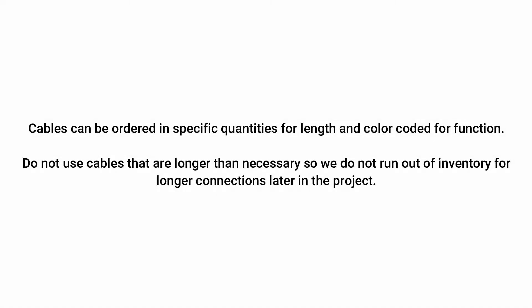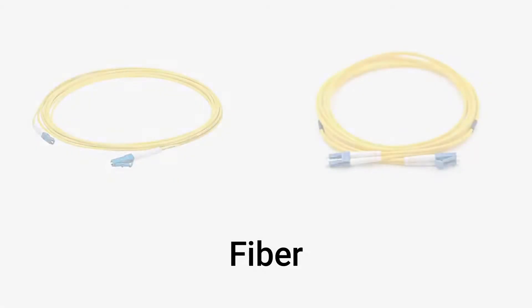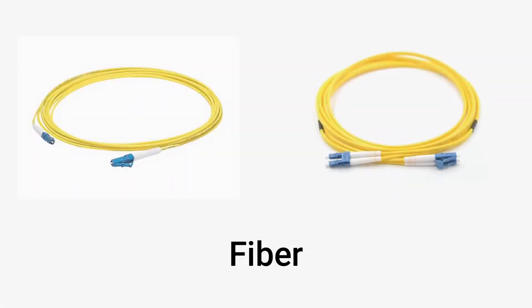On some projects, cables may have been ordered at specific lengths, colors for different functions, and quantities. For a connection that only needs a 24-inch cable, do not use a cable that is longer than necessary so we do not run out of inventory for longer connections later in the project. Data centers also use fiber cables — fiber cables are more delicate than copper and should be handled with care.